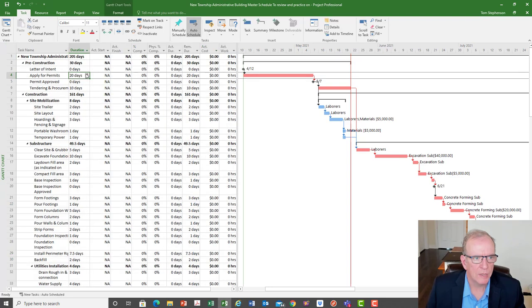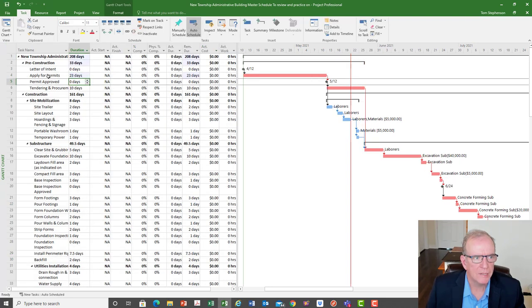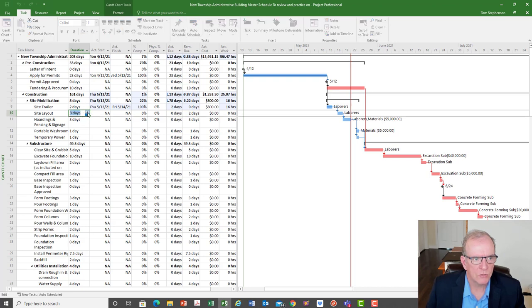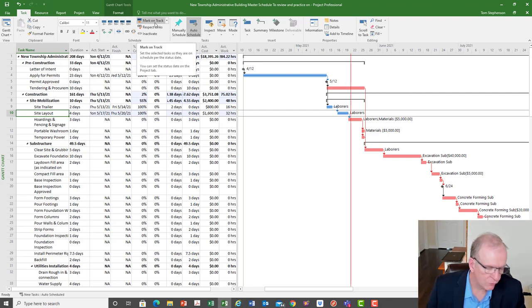I can say, you know what, this took 23 days. It's now done. I can say it's 100% done. I can say that the site trailer is completed. I could say that the site layout took an extra 2 days. So I could put 4 days, and I could say it's 100% done. And then, you know what? I could just update everything else on track. So that's where this mark on track is pretty useful.